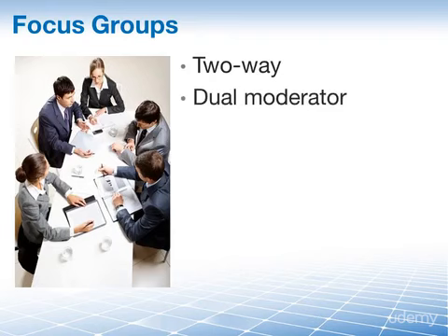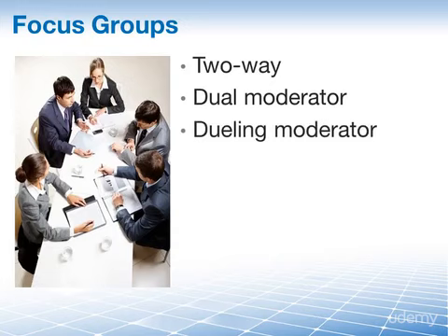We have a dual moderator focus group. This is when one moderator monitors and controls the session while another ensures that the participants discuss all of the focus group topics. Or the dueling moderator focus group. Here we have two moderators, and each of them takes an opposing side on an issue that is under discussion here.